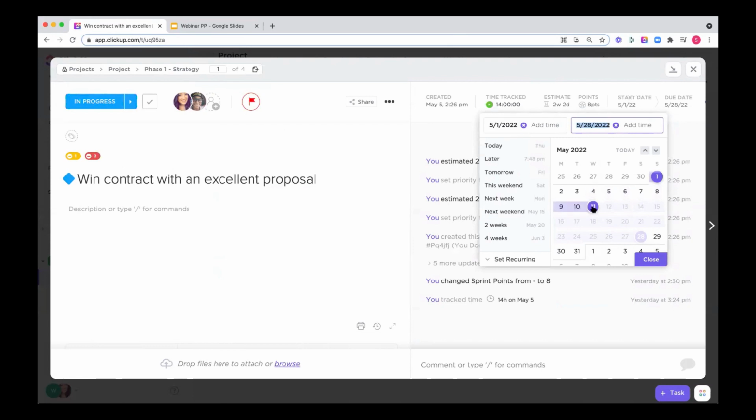You would need to, if you use something like the PTO system I showed earlier today, and someone put in a task to block off their duration for those days, then their workload on those days would be flagged in the workload view as red, but the task itself isn't going to be automatically split based on that.